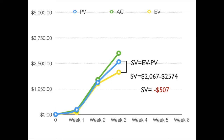We come up with a negative $507. That's our schedule variance at this point in time.